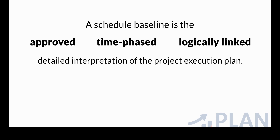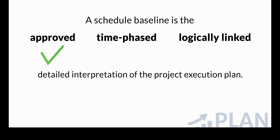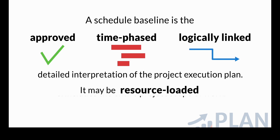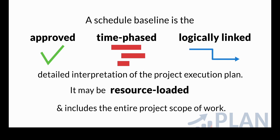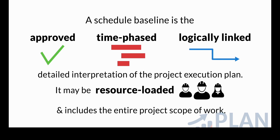The baseline schedule must be approved by the client, the contractor, and other stakeholders. The work must be time-phased — the work execution plan must be laid down with reference to dates, a calendar, and working hours, deriving the project start and end dates by logically linking all the work. A schedule may also be resource loaded and include the entire project scope. However, it is not mandatory to have a resource-loaded or cost-loaded baseline schedule; what is mandatory is that it includes all the work of the project.